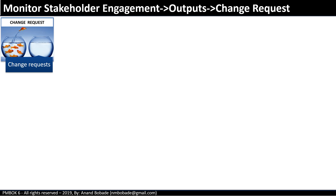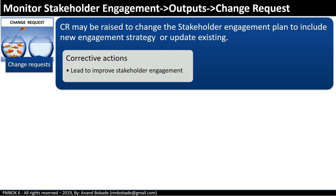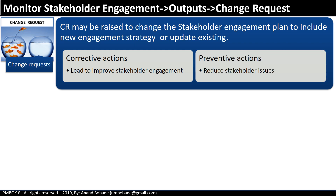Change requests may be raised to change the stakeholder engagement plan to include new engagement strategies or update existing ones. Change requests may include corrective actions to improve stakeholder engagement or preventive actions to reduce stakeholder issues. Any change requests made as a result are processed through the Perform Integrated Change Control process.